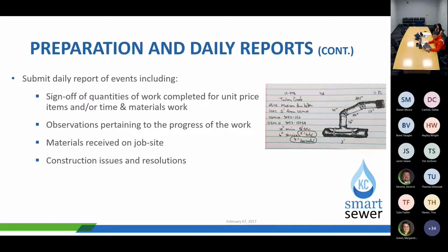Well, you have all that noted and recorded, so you have the important items for either justifying a time extension, or saying, no, this isn't acceptable, the time extension won't be granted. So just making sure that those daily reports, even the ones that you would think wouldn't be needed, actually are.